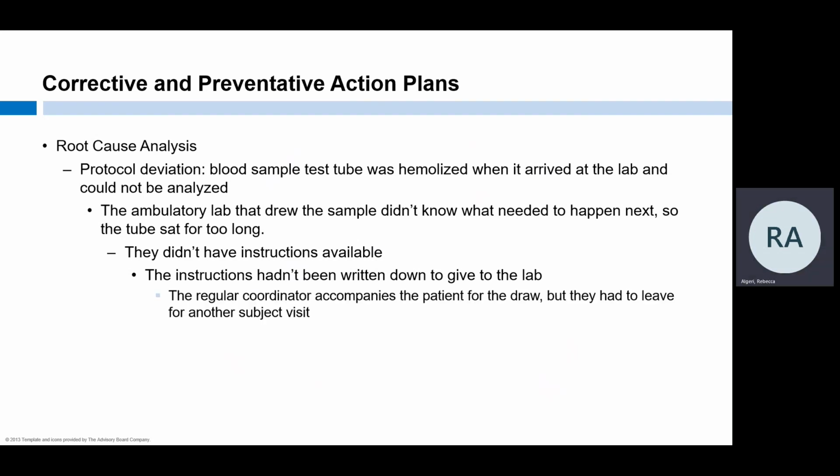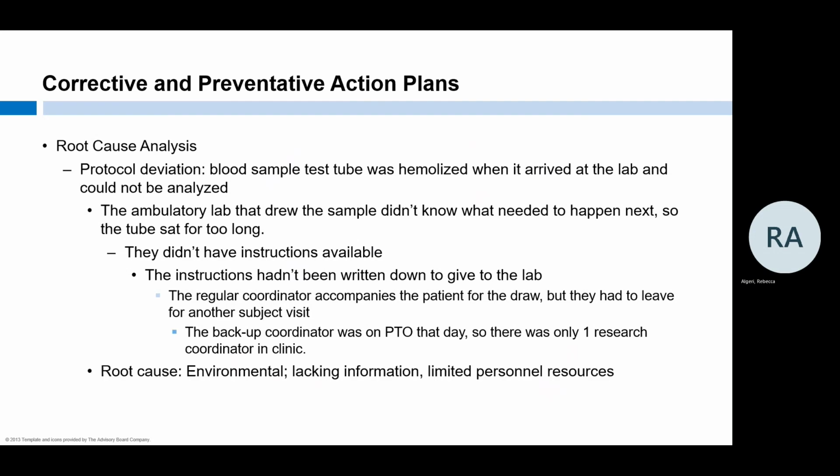Why? The instructions hadn't been written down for the lab. Why? The team didn't think it was necessary because the study coordinator has always accompanied patients to the lab for the draw. The coordinator was double booked in clinic, so they couldn't accompany this patient. Why? The second study coordinator was on PTO and there wasn't anyone else to cover. So we have our root cause, which is environmental. The lab was lacking information and there were limited personnel resources for that day.